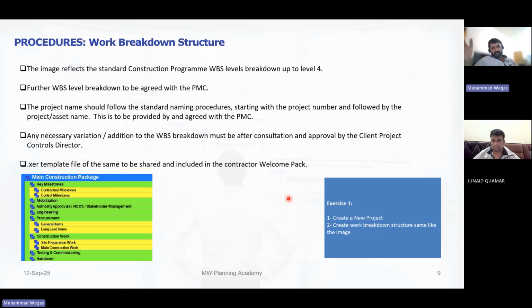But maybe some companies prepare two schedules, I don't know. But it's not a good idea to have multiple schedules. We have to update repeatedly for both schedules. Otherwise you are doing good effort two times, but of no value, because it is the same information. As I am telling you now, from the baseline you can also push your team early, 1 month, 2 months, 3 months. It's up to you.